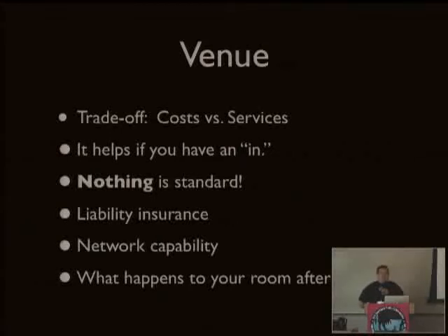If you walk into a room and there are wall outlets along the wall, don't assume that you can plug something into them for free. The first 12 venues you check out might say, oh yeah, that's standard, that's part of the room. But if you walk into the 13th venue and assume that comes with the room, you may be in for a rude awakening when you get your bill. There is no standard.